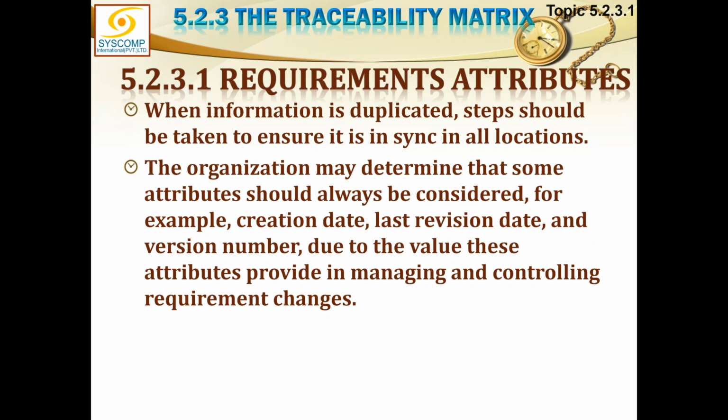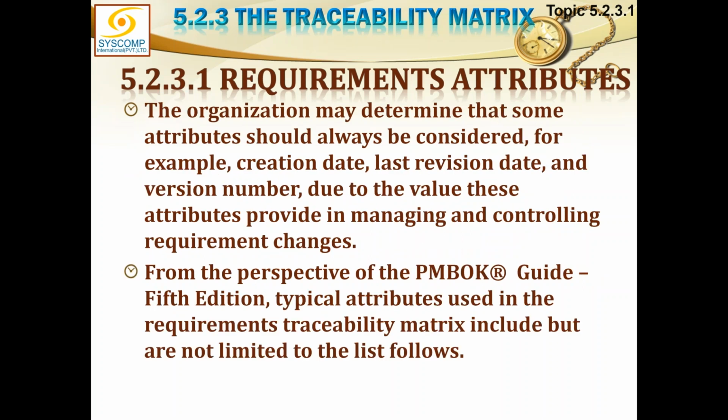The organization may determine that some attributes should always be considered. For example, creation date, last revision date, and the version number, due to the value these attributes provide in managing and controlling requirement changes.